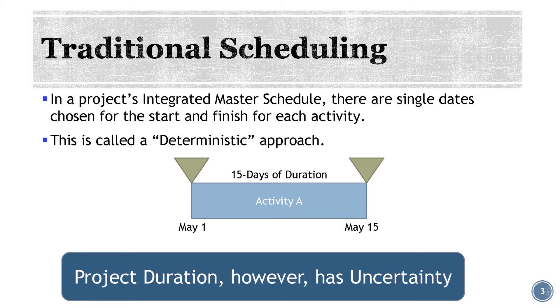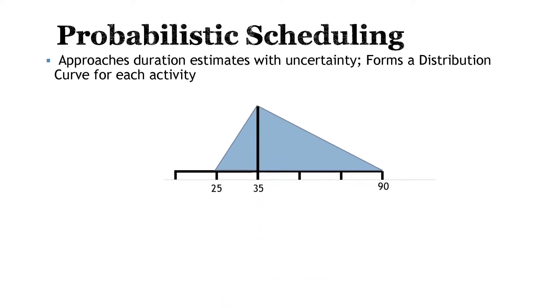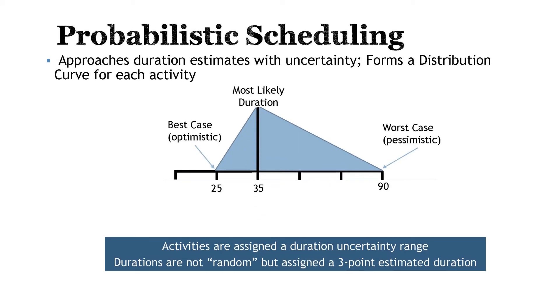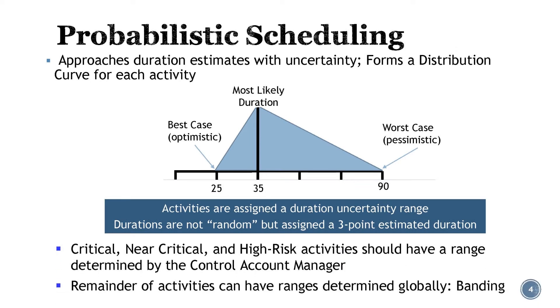However, in reality, project duration has a degree of uncertainty. Probabilistic scheduling introduces the application of a date range. This process approaches duration estimates with a degree of uncertainty, and forms a distribution curve for each activity based on the evaluated best, worst, and most likely duration estimates.